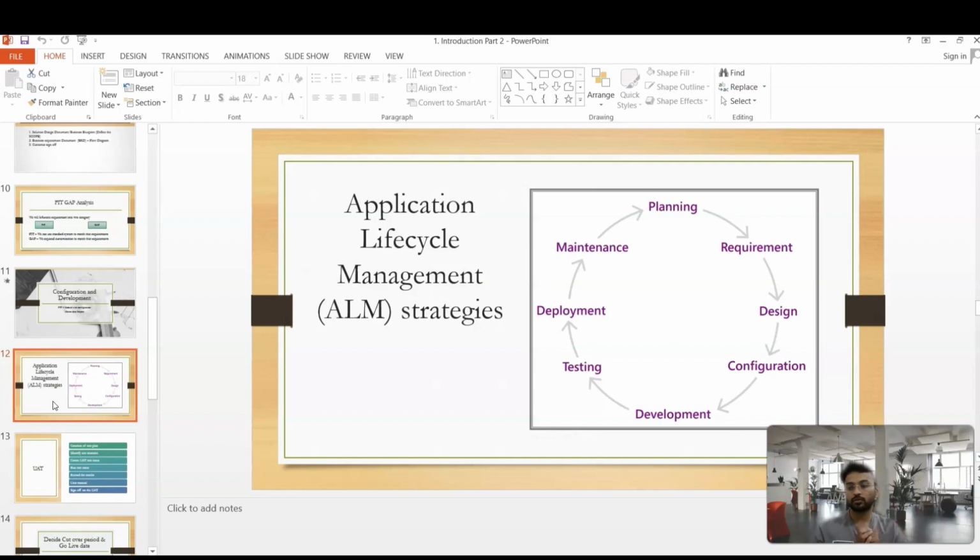For development, we use various software and various VMs. Basically, which VMs do we use during the implementation? I am going to discuss that now. First, each developer has their own virtual machine for development purposes. They develop all the customization in their own development server. After developing, the functional consultant tests that customization, and when the functional consultant feels it works as per the requirement of the user, we move the code into the QA server.